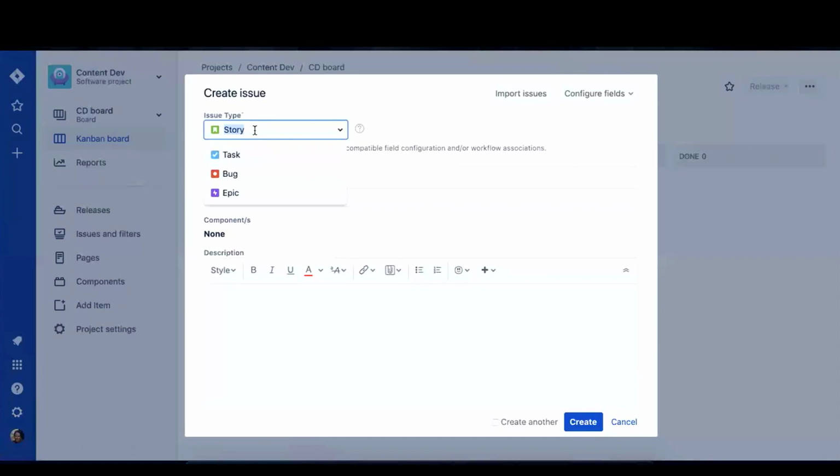So if we're putting an event together, what are some of the things that you need to do? We will need to select a venue. You'd probably have invite people, arrange travel plans for ambassadors that will be attending this event, set a time, create an agenda. There's so much that'll go into it. Music, sound, security, staffing, food, beverages. Exactly. Those would all be individual stories.